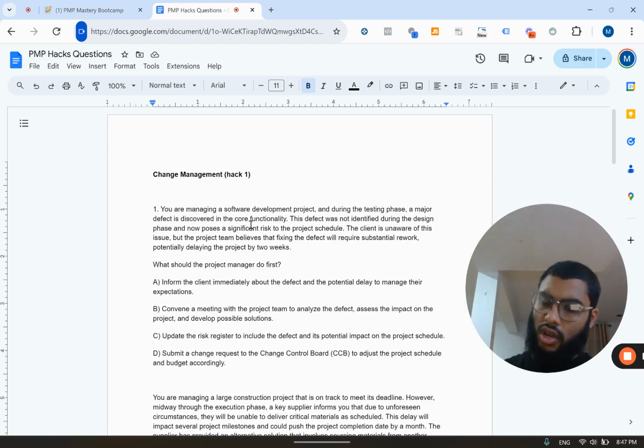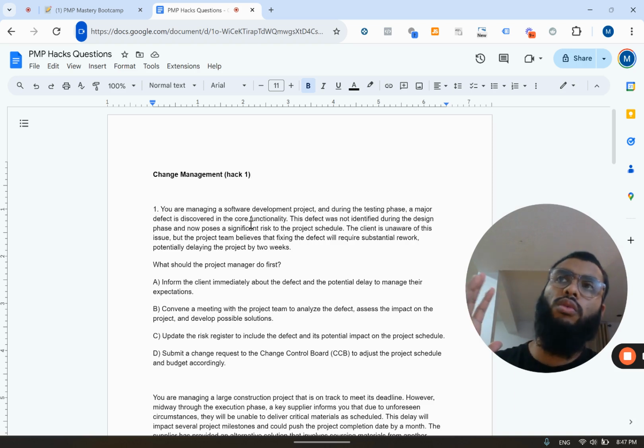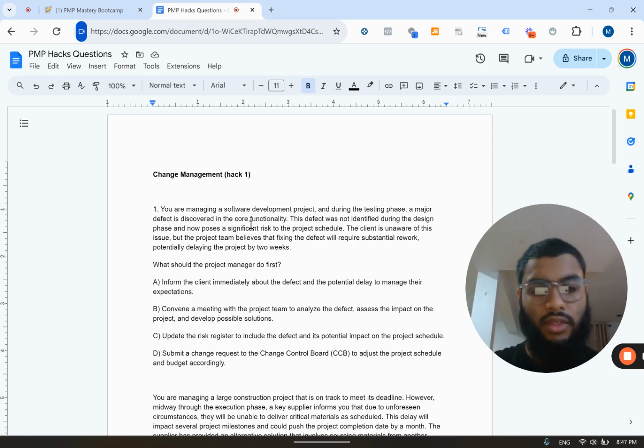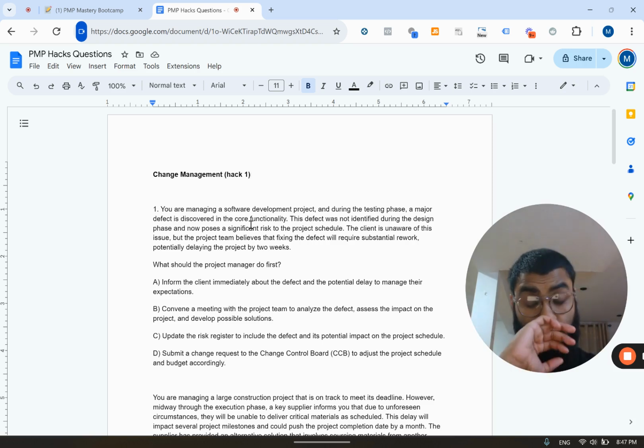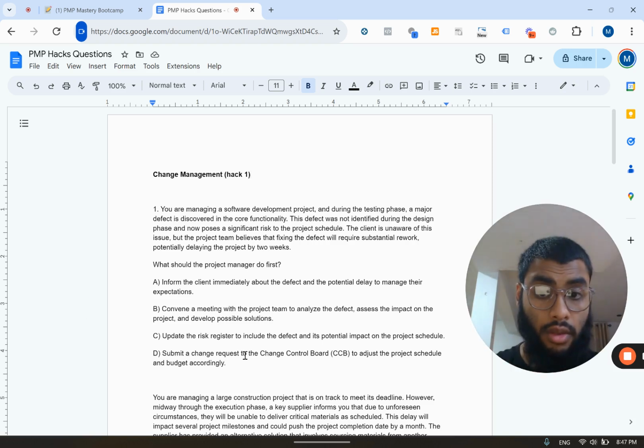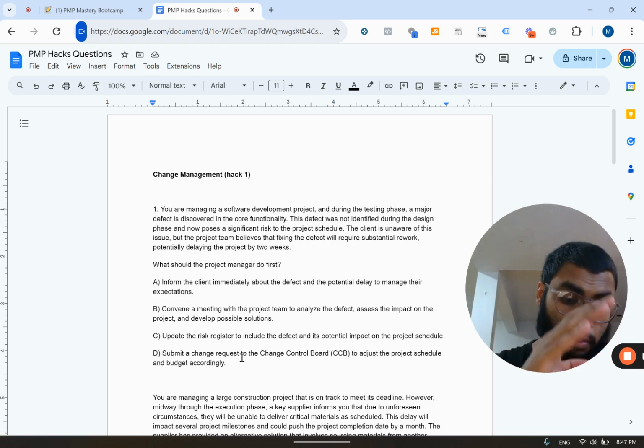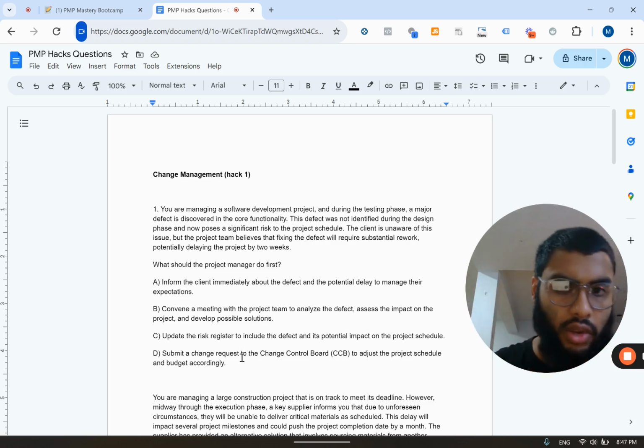They discuss with all the information they have at their disposal, and then they decide to reject or approve this change, and then the change is communicated and executed upon. So in other words, this change control process includes principle number 1, which is the PM taking a step back before deciding on a solution.